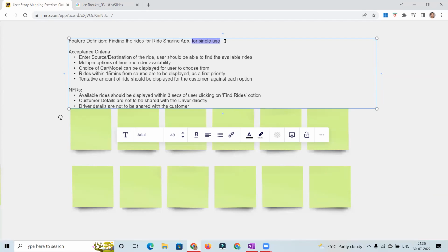Then we need to have a flag for the ride provider which says they are accompanying someone. Based on that flag, we can filter this. Here is my take on it. We are preparing an MVP. For the MVP, we can assume that it is just one passenger, and that it is something we would like to add in future, but maybe not now. The first thing we need to do is to ensure that I can get a ride.